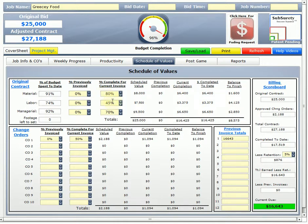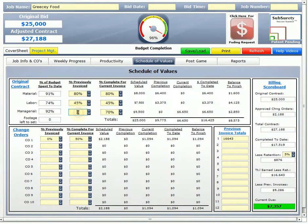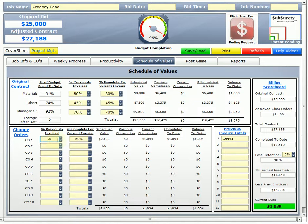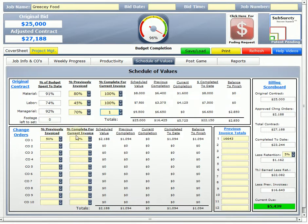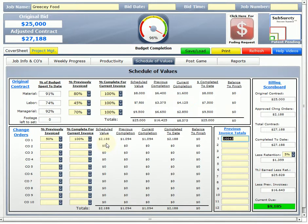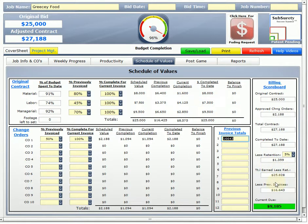Now, I've already submitted the first schedule values. So, now I have a previously invoiced and that's real easy. You just come over here. I previously invoiced 80%, 45%, 70%. And down on my change order, I previously had invoiced 50%. Now, I'm finished with the job. So, I'm going to bill 100%. You just type in 1 and that's 100%. So, now we can look across the board. Balance to finish is 0. I've completed to date 25,000. My current completion is 8,575. Previous completion was 16,425. Same thing, same information down on the change orders. And my billing scoreboard shows exactly how everything is played out. Total retention. Total earned. Less previous invoice. 9,185.